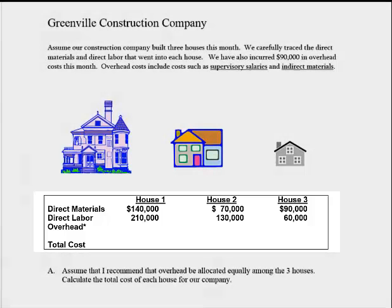The company also has some overhead costs. We have several supervisors that we pay who travel from house to house, and the construction workers use a lot of indirect materials — drywall, cement, nails, screws. Indirect materials are items that are too small or too inexpensive to bother tracing how many we used on each of the three houses. So all that together totals $90,000.